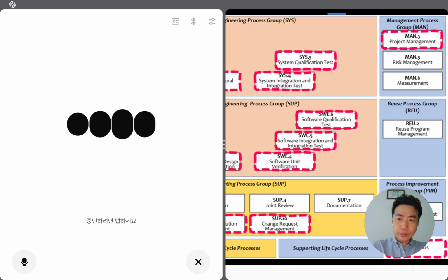What to prepare as evidence, concrete, showable. Scope and tailoring record: lifecycle model, ASPICE scope, reasons for tailoring. WBS, schedule, milestones, gates, deliverables, dependencies, buffers. Resourcing plan: role matrix, skill needs, onboarding, backup plan. Cost and effort estimates and basis of estimate: assumptions, historical data. Quality plan: what QA verification, reviews, and tests happen and when, ties to SUP.1, SUP.2. Risk register: ID, cause, impact, owner, mitigation, status trend.